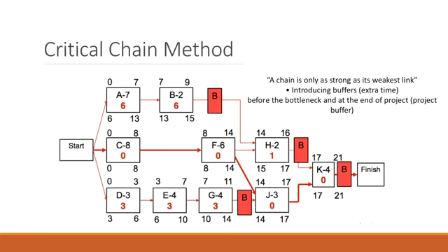The second one is Murphy's Law, or rather Parkinson's Law. Parkinson's Law is really similar to what you do as students. I noticed it on assignment number 1: it didn't matter how much time I gave you, most of you completed assignment number 1 the day before or the day of the deadline. That's what Parkinson's Law says: a given worker is going to take as many days as you give him or her to complete a particular task. So let's say that you have 2 weeks to complete assignment number 2.